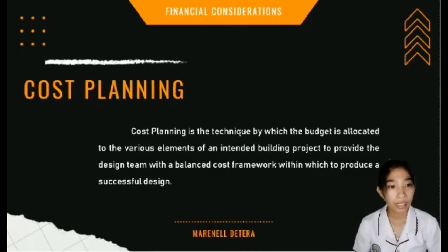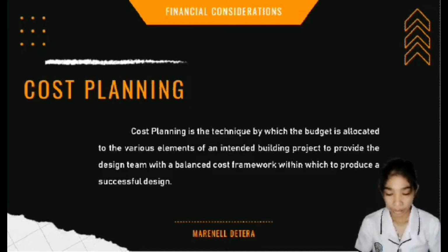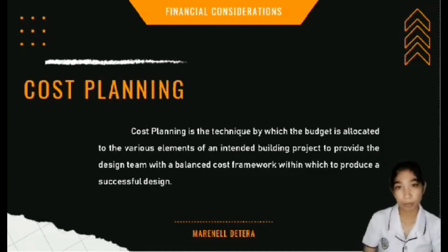Cost planning is a technique by which the budget is allocated to the various elements of an intended building project to provide the design team with a balanced cost framework within which to produce a successful design. It evolves through the life of the project, developing in detail and accuracy as more information becomes available about the nature of the design, and then actual prices are provided by suppliers.